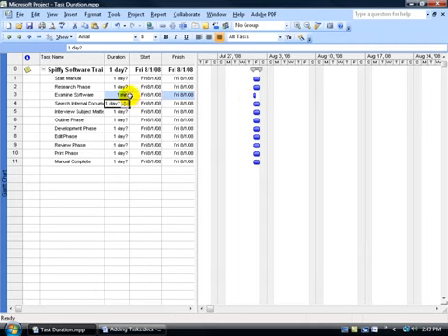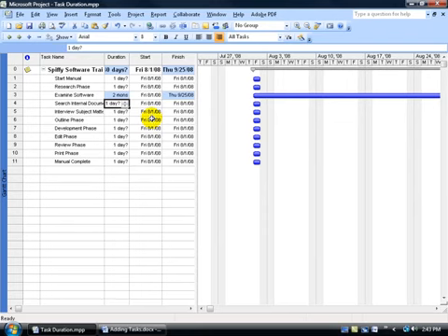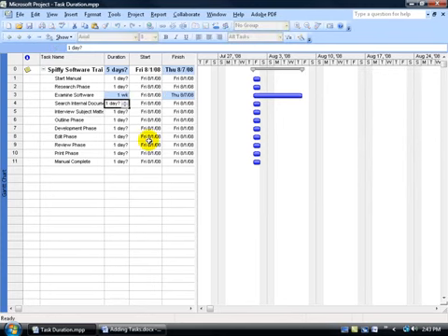Now the difference between entering in minutes and months: with minutes it's the letter M, with months it's MO. So what's your MO? Go ahead and type in 2, MO, hit enter, and there's months. For hours, just type in the number and then the letter H. For weeks, type in the number and then the letter W, hit enter for your week.